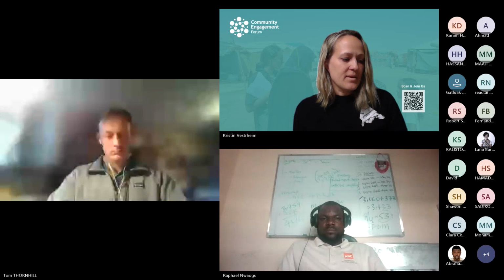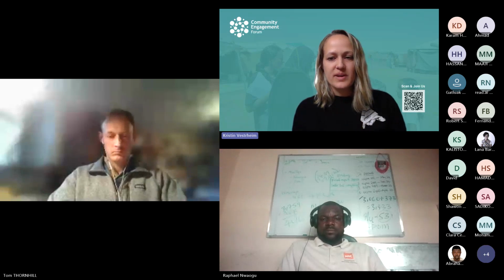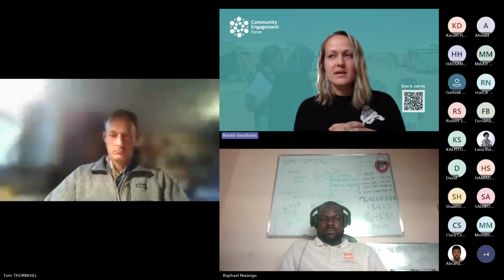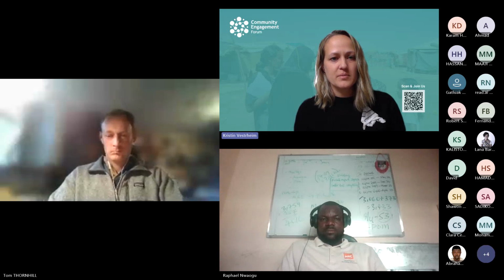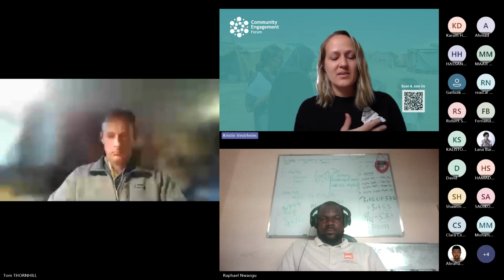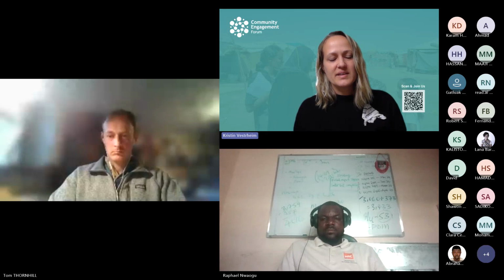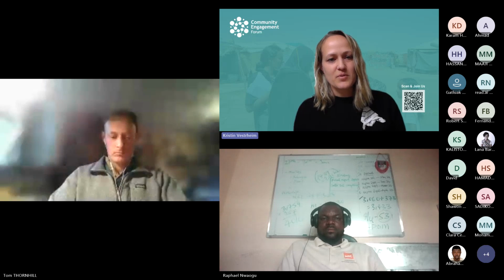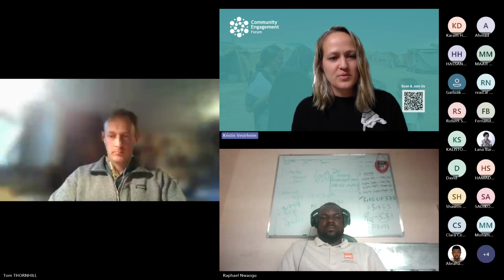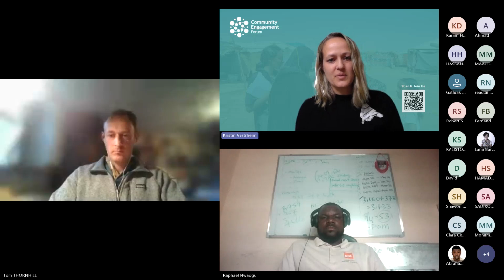And this is really important because, as the staff from Humanitarian Mine Action was explaining to me, they cannot clear everything at the same time. You have to prioritize areas, and the community knows better than someone coming from the outside which neighborhoods, which areas to prioritize, and just to know who to ask within the community is important.